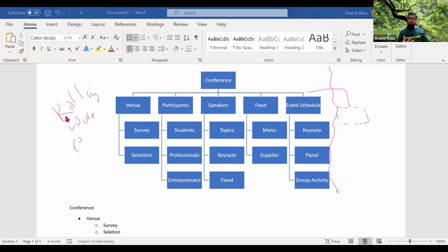For example, in an Agile project, it happens in each iteration. In an iteration, only those features they are trying to develop will be detailed down into user stories. The next iteration's user stories they will not detail down. When they enter, or before entering, the next iteration, they will detail down that feature into user stories. So they are following rolling wave planning in each iteration. All right, so there is no actual time limit. It depends. Thank you, Reza bhai.